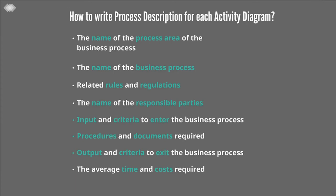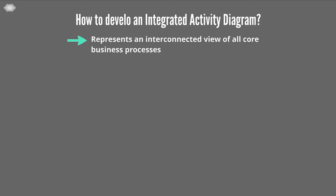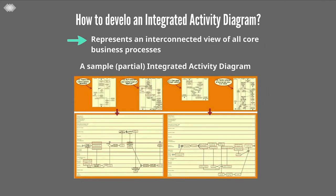Next, process analysts should develop an integrated activity diagram by integrating all activity diagrams of the business processes associated with all use cases into a single integrated diagram. The integrated diagram represents an interconnected view of all core business processes, illustrating relationships between core business processes, process participants, and information flow throughout the area under the BPA study scope. A partial integration of activity diagrams from the shrimp exportation BPA study is shown as an example.